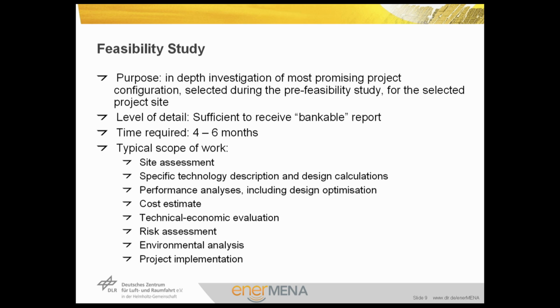The study will analyze whether the techno-economics considered are feasible. The availability of procurement slots will be analyzed in the study as well. It will also check if there is competition. Definitely, you'll speak with several suppliers to control the costs. Finally, it ends up after a cost estimate, in best cases supported by a technical economic model, which is not the final financial model of the project execution. It's a kind of early stage of analysis, what the costs in the project are and when they occur over the project duration. The risk assessment is vital.